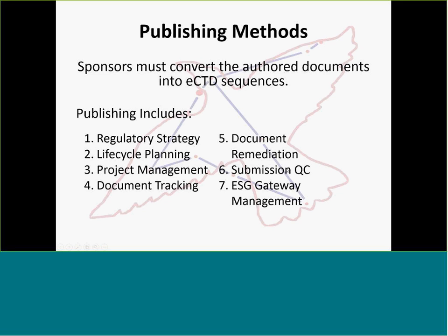We have submission QC. This is sadly skipped, or at least minimized, by a lot of sponsors as a way to save time because of lack of good project management earlier in the project. It's the part where you go through and look at every page in your multiple 100,000-page submission and ensure that the remediation was done correctly, that all links exist and point to where they're supposed to. It's a very important step and is usually about 15 to 20% of the total publishing time.